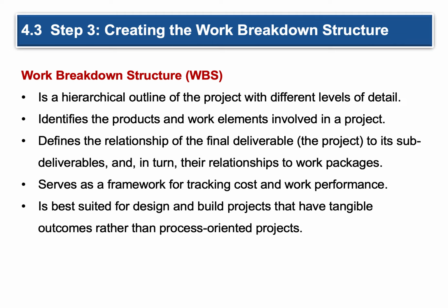Jumping on to step 3, creating a work breakdown structure. Now this is something you'll see a lot of in this class moving forward. Work breakdown structure is a WBS. It's a hierarchical outline of the project with different levels of detail. It identifies the products and work elements involved in a project. What needs to be done, right? Defines the relationship of the final deliverable, the actual final project, to its sub-deliverables, and in turn the relationship to the work packages. Basically, this is breaking down your work from big scope to nitty-gritty.